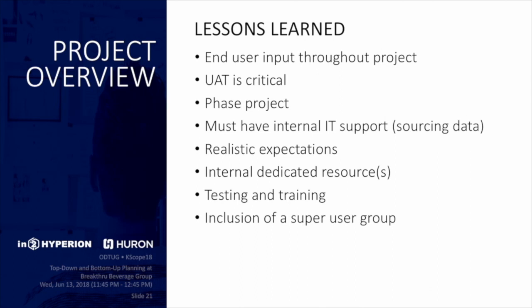Realistic expectations, must have internal IT support, sourcing data. So it took us longer to actually get the data into our system, or data that we could upload into our system, than it took us to put the system together. We wish we had started that before we even got to development.